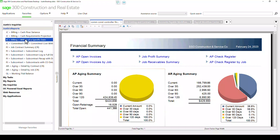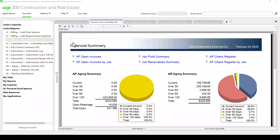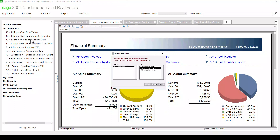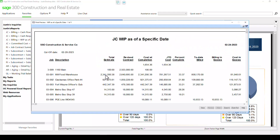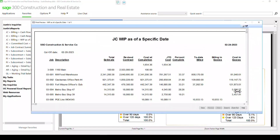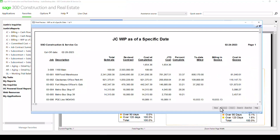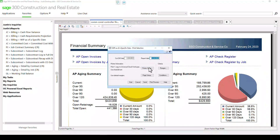Reports can be accounting reports, job cost reports — there are about 16 standard reports that come with the system. This is a very typical WIP style report. I'm just going to leave the cutoff date as 02-28-23. When we click print preview, we can see the particular projects we have, costs and billing and excess. This could be saved to PDF or saved to Excel.